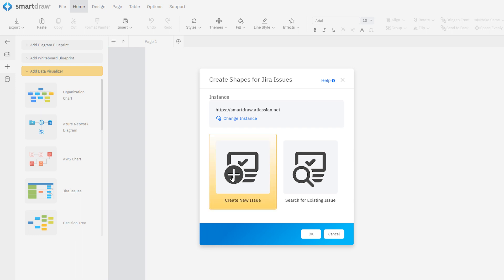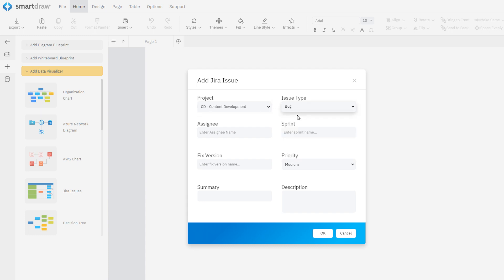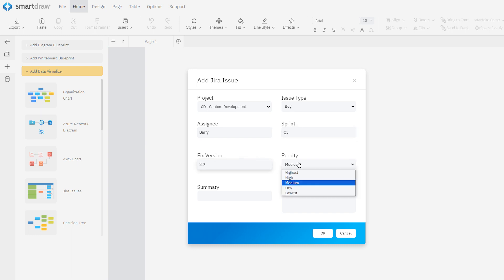Click Create New Issue and choose the project you want to add an issue to, and then specify the issue type, assignee, sprint, fixed version, and priority, along with a quick summary and description.